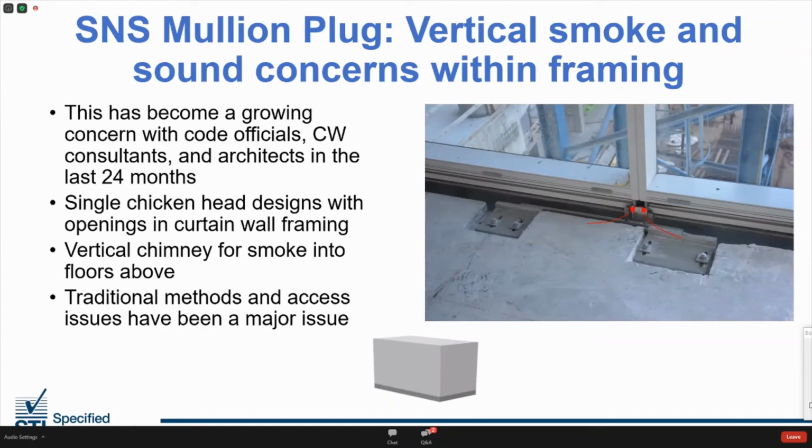And before we end this section, I just want to emphasize, just like anchor protection, our curtain wall team spends a lot of time addressing these situations also. I know there's a colleague of mine on the webinar today who was involved in a project that had this exact condition. It was not addressed prior to the units being set, and unfortunately, all the vertical mullions at the stack joint on the entire project had to be cut open and addressed after the fact. So again, please feel free to get our team involved as early as possible so we can properly address these conditions for you.